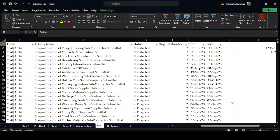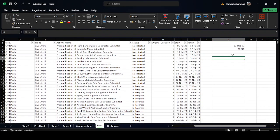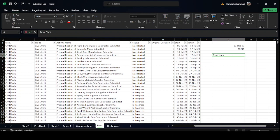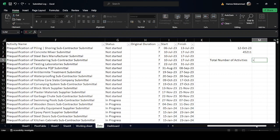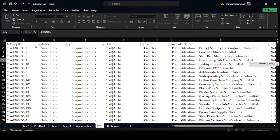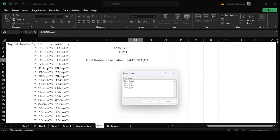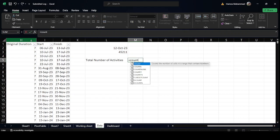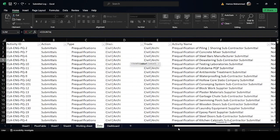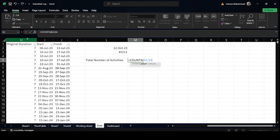Now we want to know how many activities are in the program related to engineering. We type 'Total Number of Activities' and use the COUNTA function, since I copied only the engineering portion of the program. Using COUNTA on the Activity ID column — select the full column, press F4 to lock the formula — and close the parenthesis.